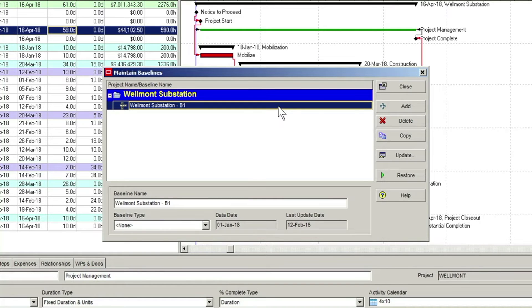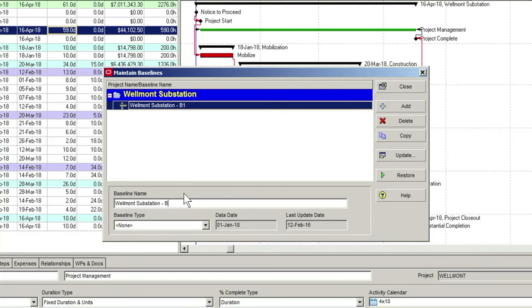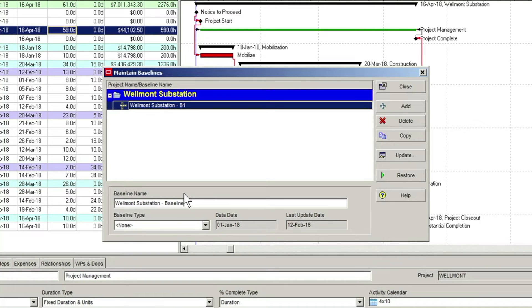In the lower portion of the dialog, you can edit the name of the baseline project using the Baseline name field. You can also view the data date and the last update date, indicating the date on which the currently selected baseline was created.